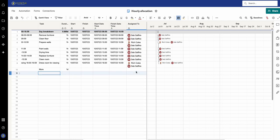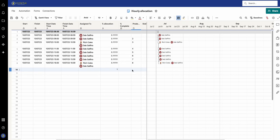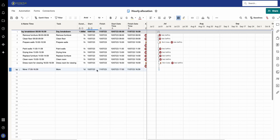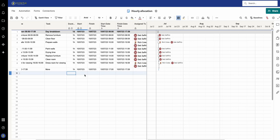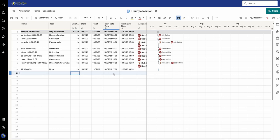I'm just going to put this as a task here with the predecessor as nine. You can see that's one day. I'm going to turn that into one hour on that basis. Then you can see that carries on until six. If I make that two hours, it's going to move and start and go over to the next day.